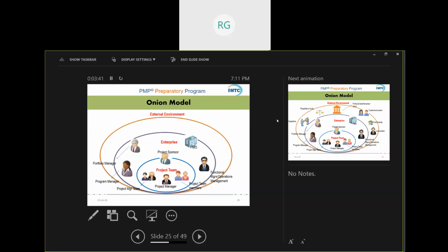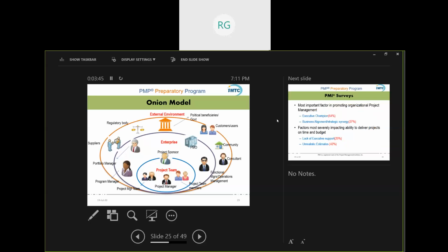You go beyond your organization to an external organization, for example, government bodies. We took that reference of the airport project. If you don't have an environmental clearance, that project can go on hold. You're not going to talk to them regularly, but at some point you do want this clearance to be there, and so they also become a part of the stakeholder community.